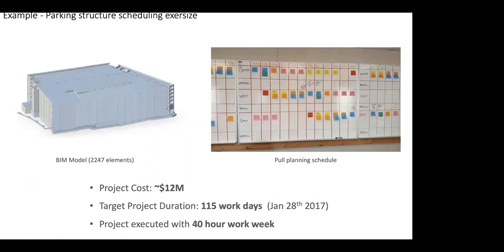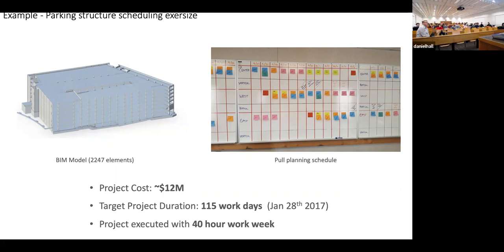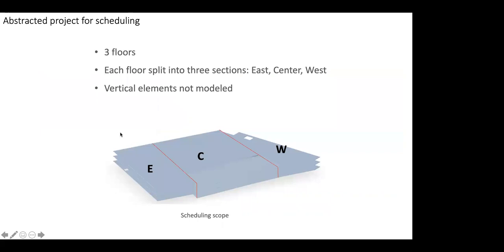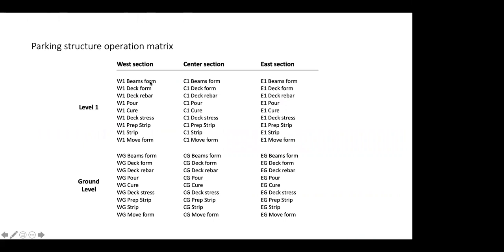Let's take a look at a simple, stupid project — a parking lot. This is the first project we ever ran with this technology. It's so simple that most people get confused at why we're using it as an example. We've got a parking lot: total one million dollars, 115 workday target. It has three floors, split into three sections: east, center, and west. Each of those sections has these tasks: beams formwork, decks formwork, deck steel, pour the concrete, cure the concrete, stress, repair, strip, move the formwork. You repeat these tasks for each of your sections.